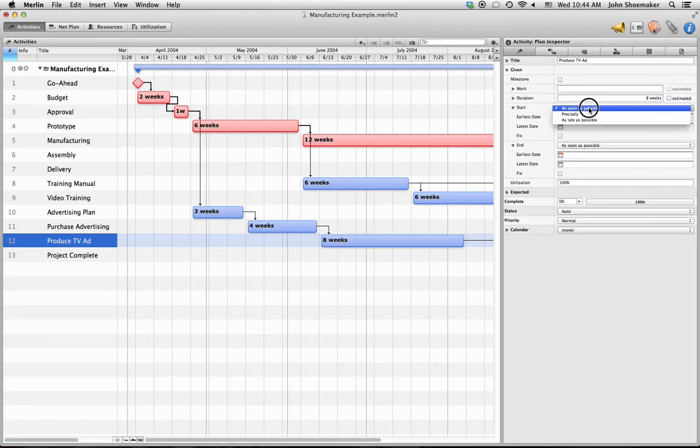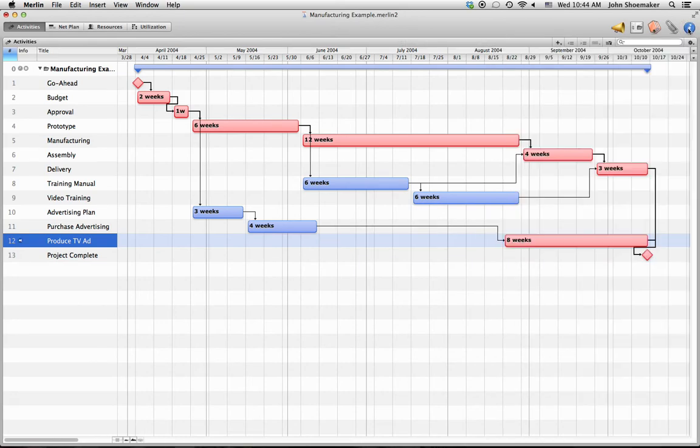Okay, and I want to start this as late as possible. And let's see what's happened. Now we have to start it in the middle of August. What happened here? Well, we've essentially taken the slack that came after producing the TV ad and put it before.